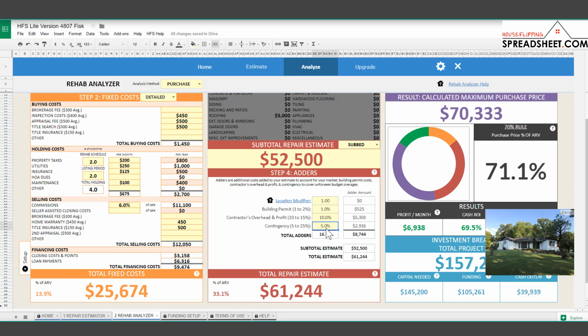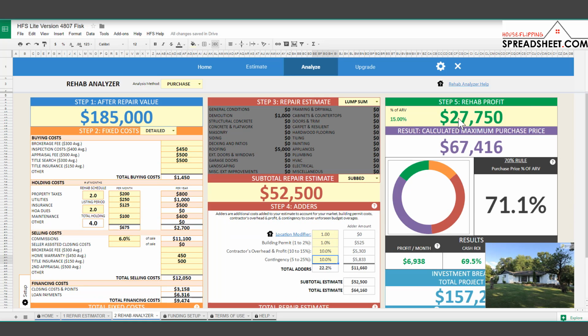Otherwise, you could be including 25 up to 50% in your estimate, which just really isn't going to be that accurate. So if you aren't comfortable with estimating costs, then you really need to be getting in touch with your contractors and subcontractors to get those real values from them to help minimize some of that risk so you don't have to carry such a large contingency in your budgets. So again, 5 to 10% would probably be pretty reasonable. Anything above that, just make sure you're getting in touch with your contractors because they'll be able to help you out and eliminate some of that contingency.